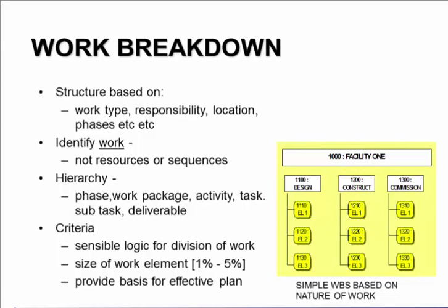Okay, so make sure that the tasks are logical. Then work out the hierarchical structure, how they interrelate to each other. Are they subtasks? What are the deliverables?